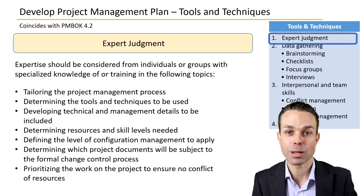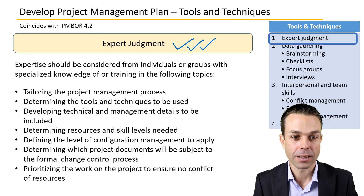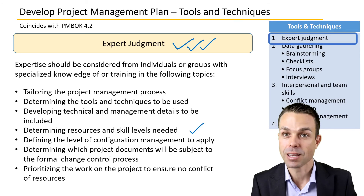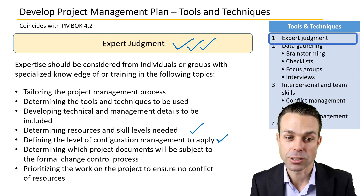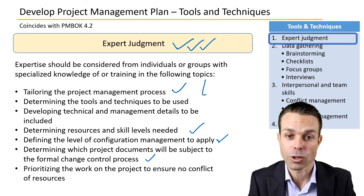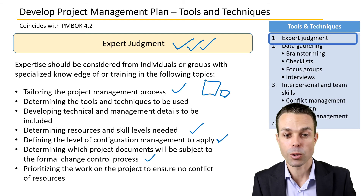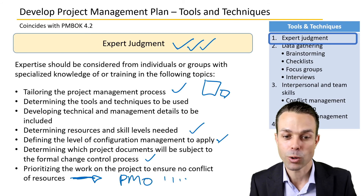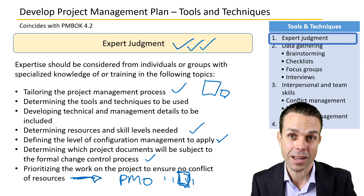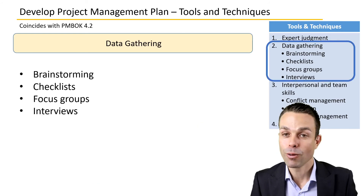For tools and techniques, we need expert judgment from various experts. This includes determining the resources and skill levels needed, defining the level of configuration management, determining which project documents will be subject to formal change control, tailoring the project management processes for a big or small project, and prioritizing work to ensure there's no conflict of resources — perhaps tapping into a project management office.